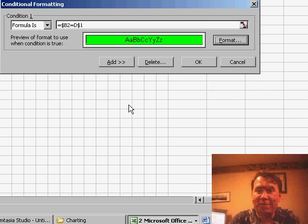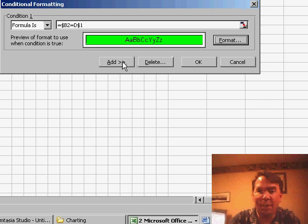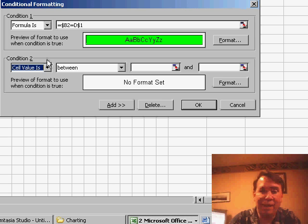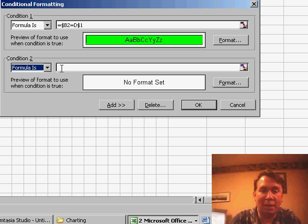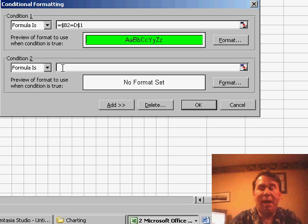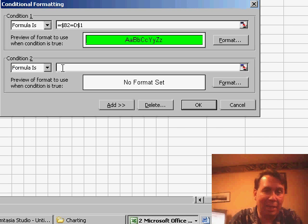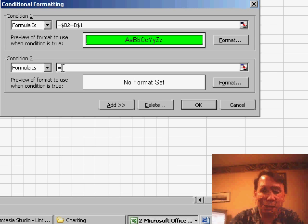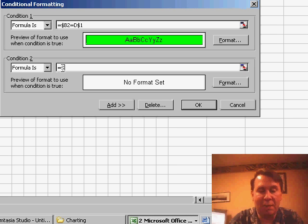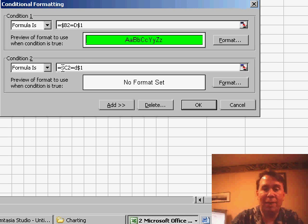I have the first of three formulas set up. If I click Add, I can create another condition—Formula Is. This time, I want to see if it's the ending year. So I want to check if $C2 is equal to D$1.